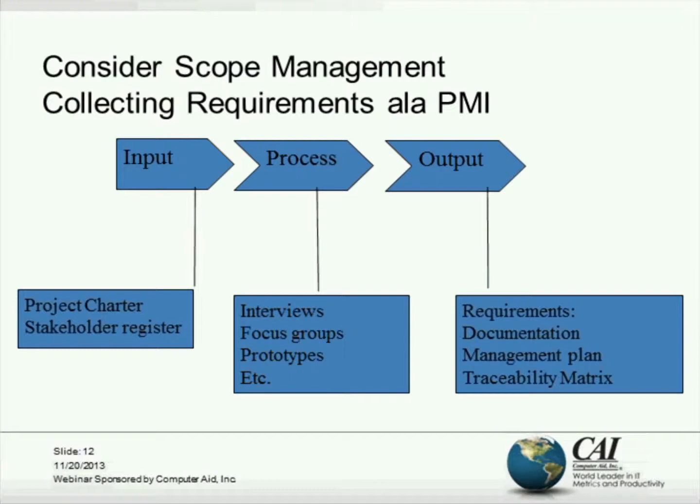Our project approach, in turn, establishes some of the risks to which the project will be exposed. For example, if we have a microcontroller-based product, we know we're going to be exposed to software risks. If we select a microcontroller that's still under development, then we expose our project to the possibility that the microcontroller will never make it to production — and there are plenty of stories of those kinds of events happening.